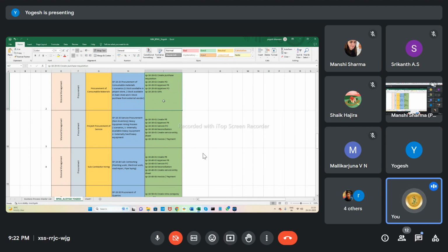Again, the process is: you create the purchase request, and this purchase request is uploaded in the project site. Then this purchase request is converted into a purchase order. That is called the STO purchase order. Then there is a delivery. That is the intra-company stock transfer process. So in case 2, stock is available in a central warehouse, and through the STO PO we are going to procure it.